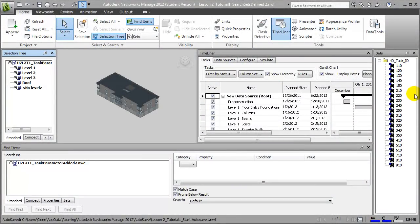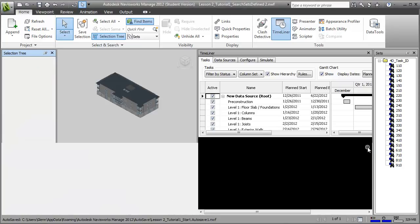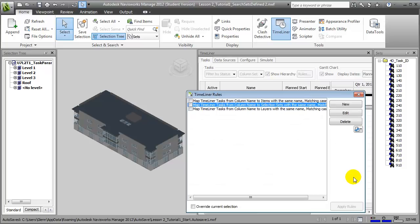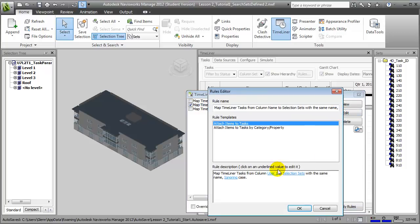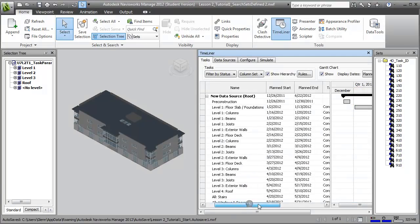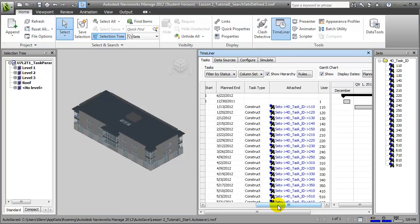When we're done entering all of the different values, we can close the Find Items window and return to the Task Timeliner pane, then choose the Rules button on the Tasks tab. The Timeliner Rules window lets us create and edit rules that will map Timeliner tasks to specific items, selection sets, or layers within the model. Let's choose the middle option, Selection Sets, and edit the rule. What we'll be choosing is to map the User 1 column — that's the one that contains our 4D Task ID — to Selection Sets with the same name. We'll say OK to that rule, then say Apply those rules. When we close this window, we can scroll over to the Attached column and see that each of the different tasks in our timeline now have a search set associated with them that will automatically pull elements from the building model.